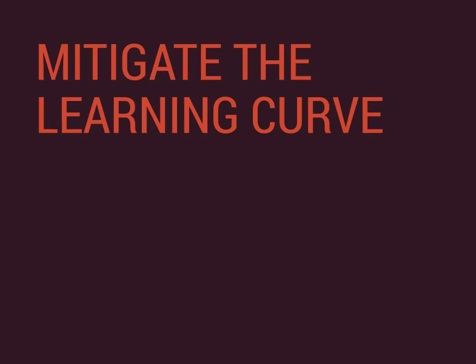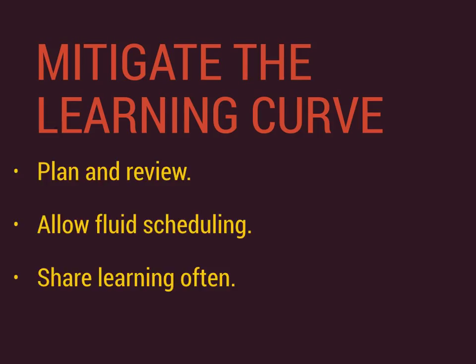And then finally, I really like taking time to do weekly internal demos, which are not about proving finished, it's about proving problems. They can be very experienced programmers, but when they're learning new technologies, I love to have folks get on a call and say, this is what I currently can't solve. We tended to do them on Fridays, at the end of every week, so there was absolutely nothing technical blocking the team starting Monday, and they could get rolling at the very beginning of the new week. So those are the three points. Plan and review, that's my technical review board. Allow fluid scheduling, Kanban, and share learning often.